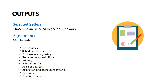The outputs of Conduct Procurements include selected sellers — those chosen to perform the work — and agreements or contracts with them. Contracts can include deliverables expected from the seller, the schedule baseline, performance reporting, roles and responsibilities, pricing and payment terms (perhaps per deliverable or by the hour), the place of delivery, inspection and acceptance criteria, warranty, penalties, and incentives. These are all things that could be included in a contract with a seller.